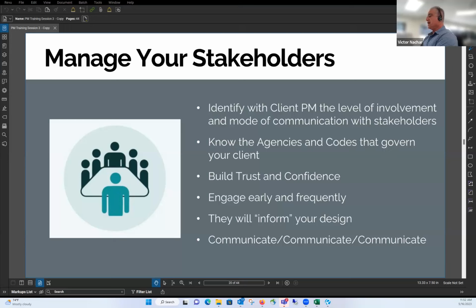The reason for that is some of the departments involved may have 2 or 3 projects in the queue right now, but a few months from now they may have 14, 15 projects in the queue, and they're not going to respond in 2 weeks.